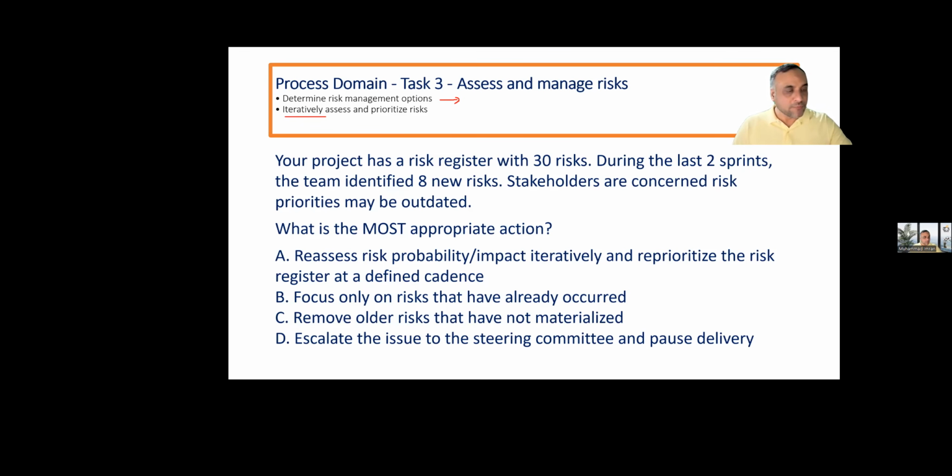In adaptive project management, we have spikes. We run spikes. Spikes are iterations we do to identify the risk exposure level of the project, to understand whether we should continue or terminate the project. We do two types of spikes: risk-based spikes, or architecture-based, technical spikes, to check how much technical risk is involved. Can we take it? Is it within the capacity of the stakeholder or not? If not, we will not do the project or we will modify our responses.